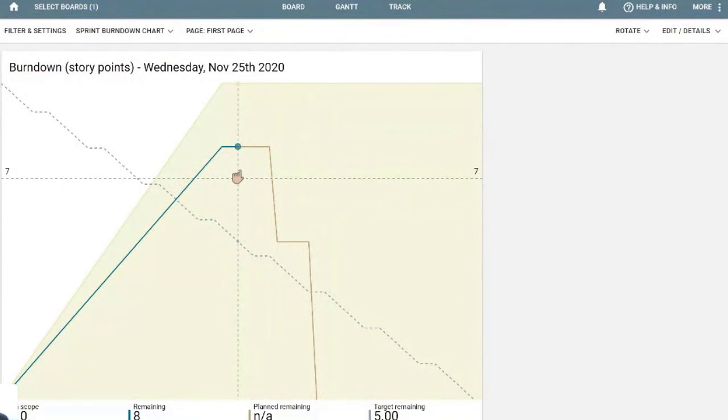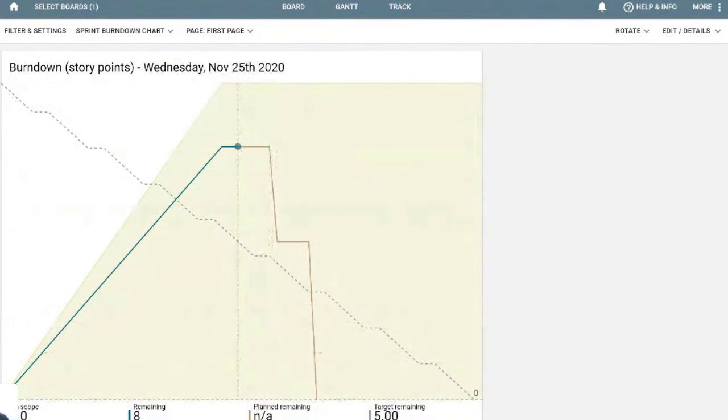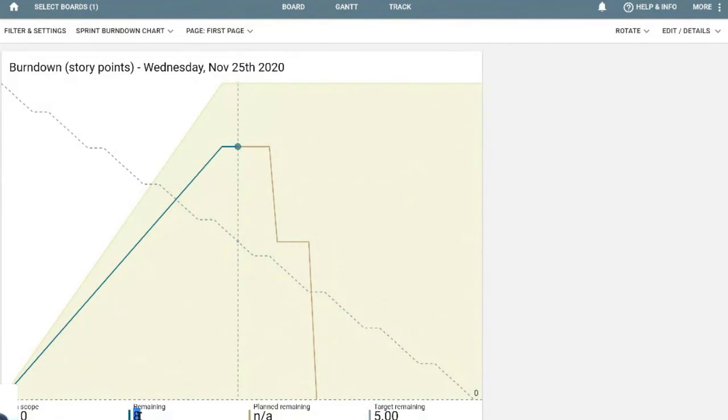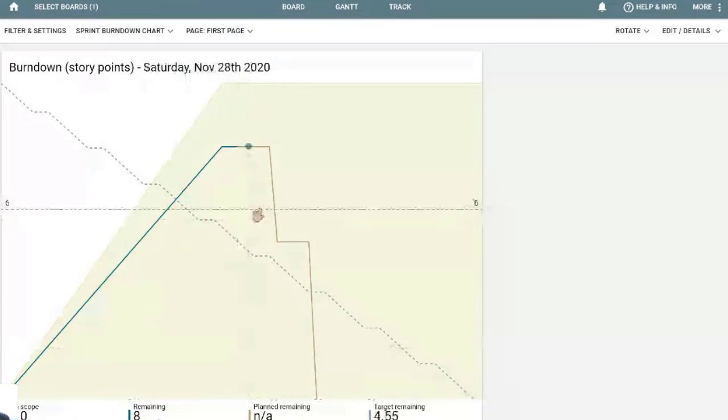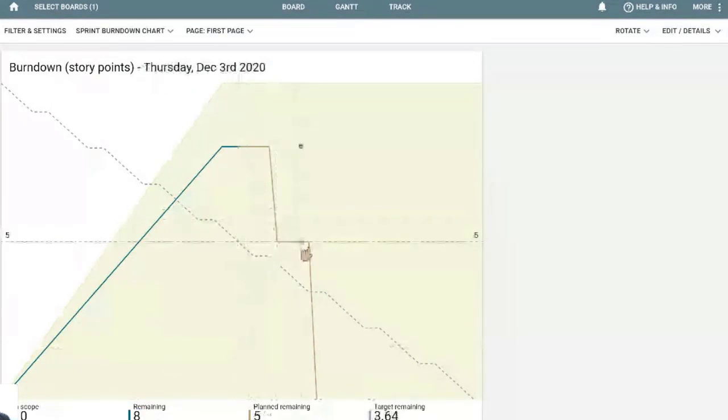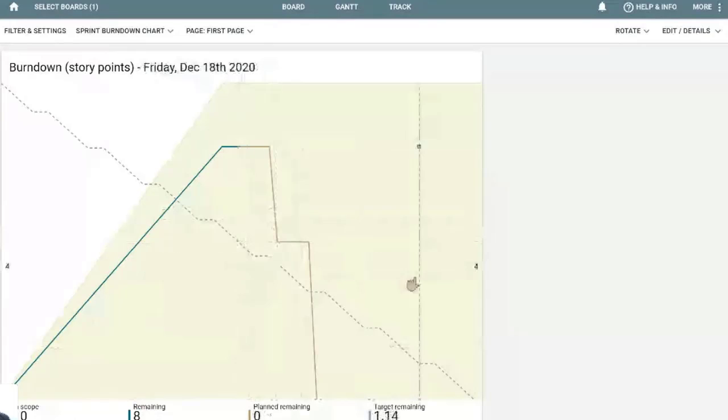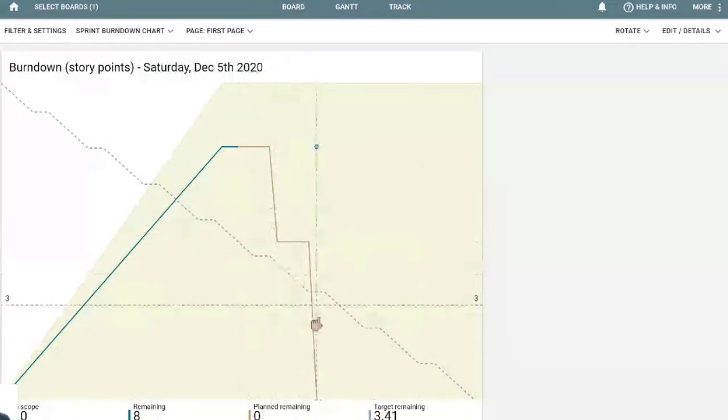And this shows you in the next two weeks, how many story points are left. So in November 25th, we had 10 story points in scope to be worked on. We have eight remaining. This means that we have already completed two story points. This is the projection for the next days. So in this case, on December 5th, we intend to have everything ready for this iteration.